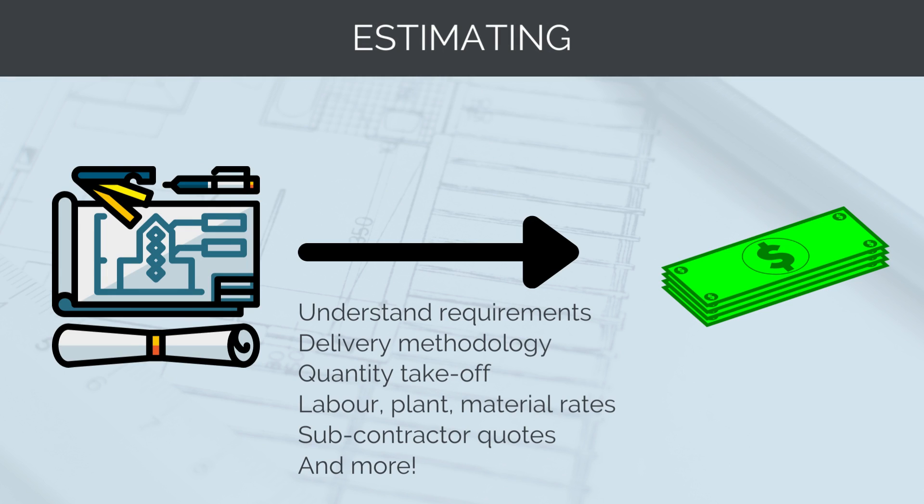So we need to understand the project requirements, work out what we're actually being asked to build, establish a delivery methodology, complete quantity takeoffs, build up labour, plant and material rates, and get quotes from subcontractors.